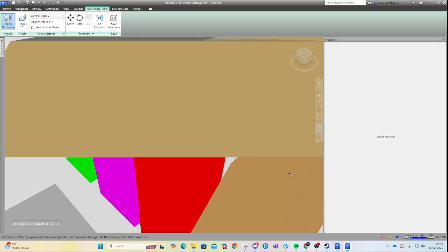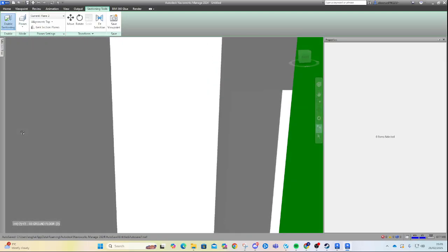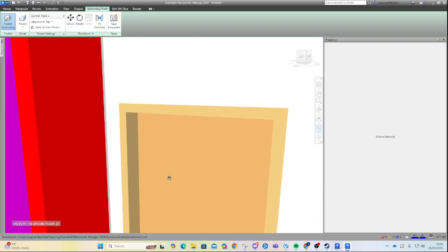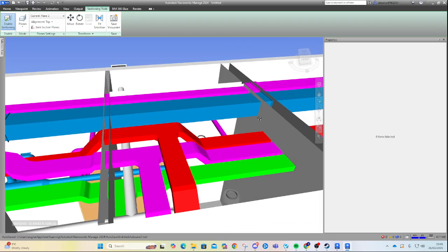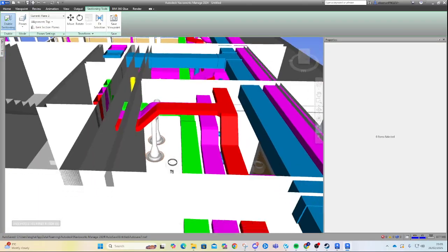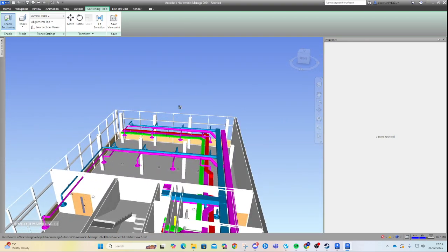Here's our riser door. If we come in, do we want the containment on the right? Are we happy with that? Do we want the board here? Should we move it onto the other wall? All these questions we can solve here in Navisworks without stepping a foot on site. So it's really good for health and safety and just avoiding unnecessary risks that may occur on site at any stage. And this is all done pre-construction stage.